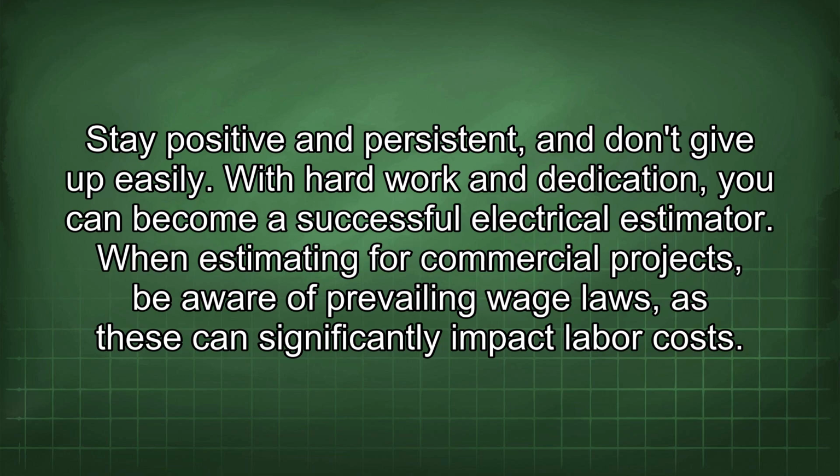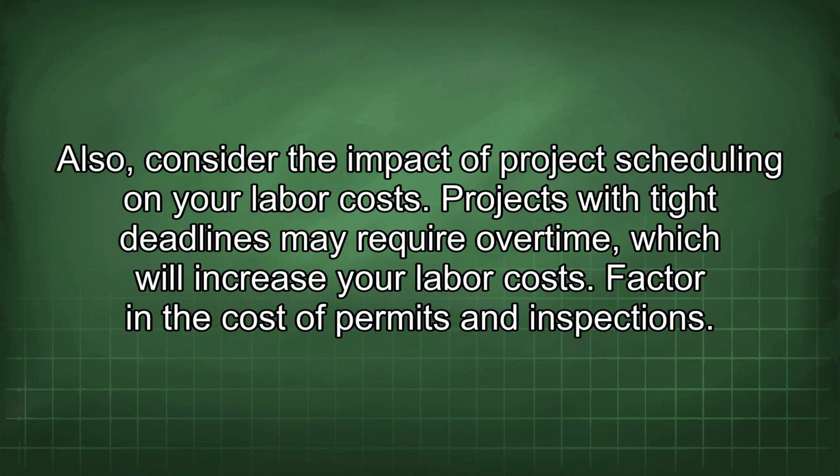When estimating for commercial projects, be aware of prevailing wage laws, as these can significantly impact labor costs. Also, consider the impact of project scheduling on your labor costs. Projects with tight deadlines may require overtime, which will increase your labor costs.